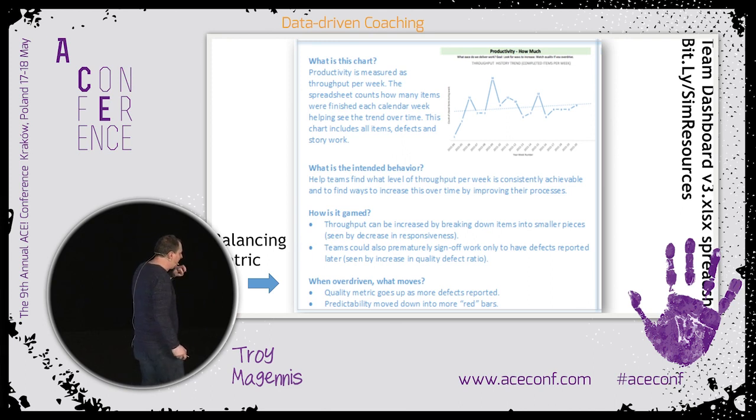But that's not enough. Just having that dashboard doesn't help the team understand how to interpret what it's looking at and know what to do with it. So if I put the dashboard in front of people, I always add an extra little cheat sheet that tells them what each part of the chart means. This is part of one that I released. You show them a snapshot of the chart, you tell them what it is, you tell them the behavior you're intending to get through it.